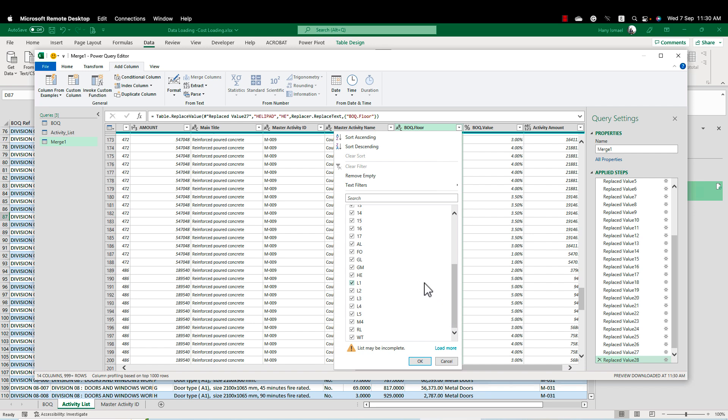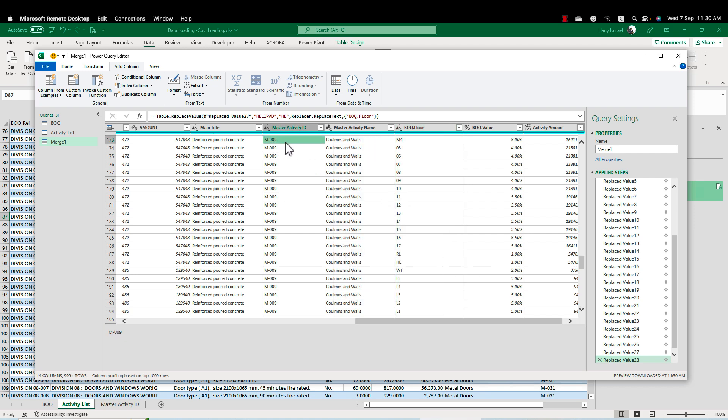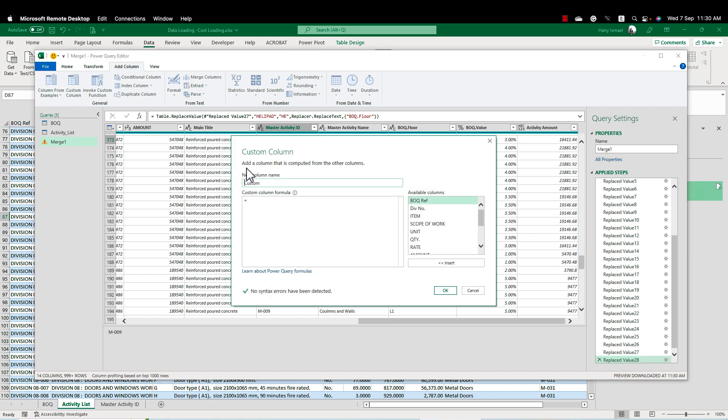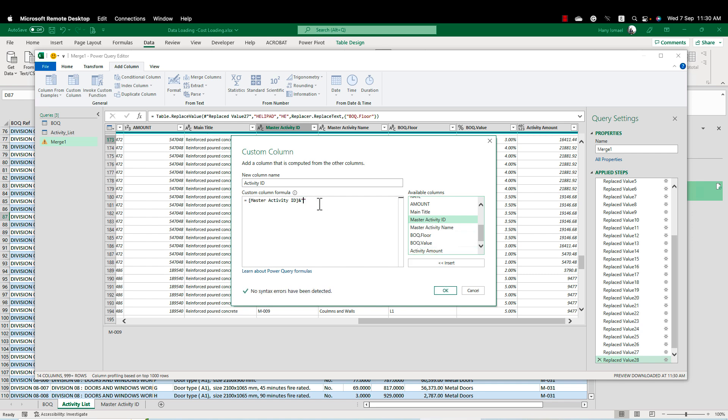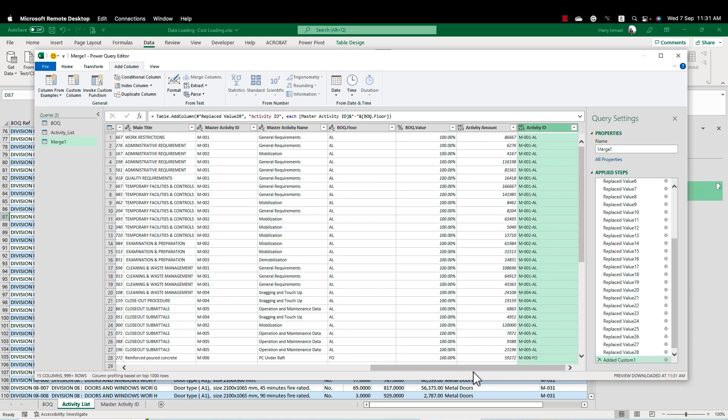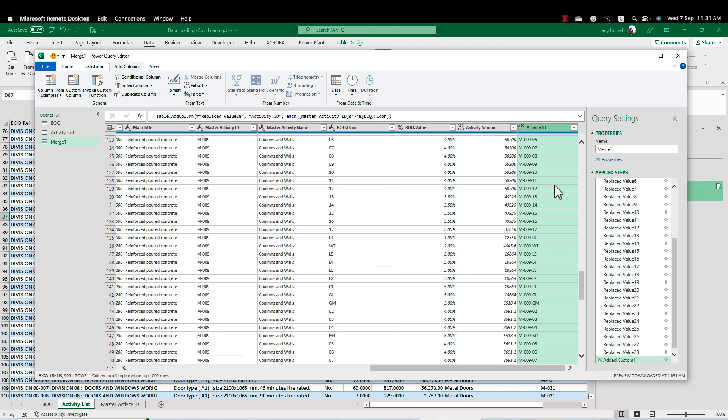Now I have a short code for each floor. We have here a master activity ID. This master activity ID is repeated in all floors or maybe in one floor or two floors or three floors. So I need to create a unique activity ID for each activity. So I'm going here to add a column. I'll call this one activity ID and in that case I'm going to add here the master activity ID and I'll make and double quota dash and the BOQ floor. Now I have here a very nice activity ID which is telling me the master activity ID and the floor. And that's it. Now I'm ready to create my cost loading.